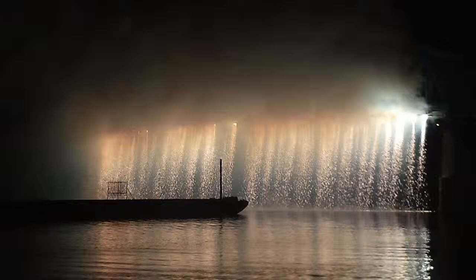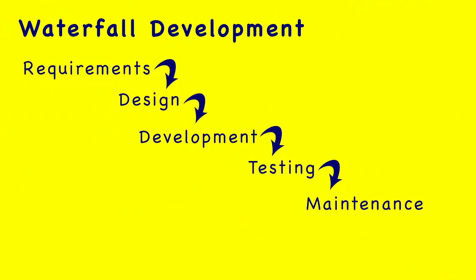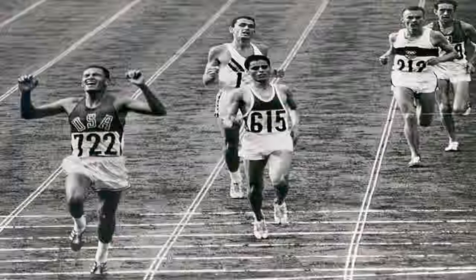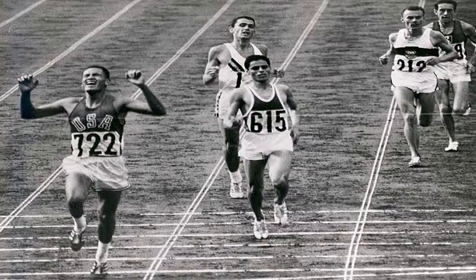The Waterfall method has its roots in manufacturing development and is a linear process from the beginning to the end. It begins with knowing what requirements need to be met at the end of the design process, and there's a lot of documentation to go along with that. Then it goes through 6 sequential steps, ending with the maintenance of the developed product, not the redesign of the product. That means once a development phase is complete, there's no turning back.